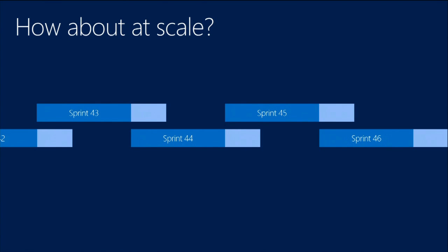And there's a whole change request process that you have to go through. You have to get approval. You have to get multiple levels of code reviews. It's quite heavy maintenance to do that, but it is possible. And I would say every sprint, there's maybe one bug that's being fixed in the branch, by different teams. So, yes.